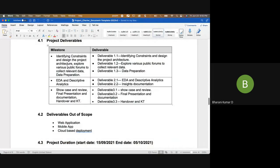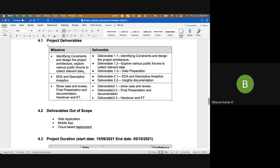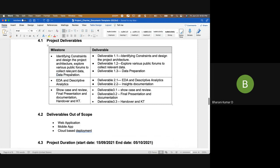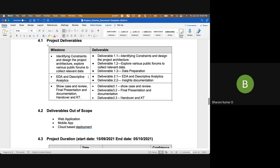For milestones, every small task you complete cannot be considered a milestone — a milestone means you have achieved something significant. Identifying constraints, designing the project architecture, exploring public forums to collect data, and data pre-processing would all be part of Phase 1. EDA and descriptive analytics would probably be Phase 2, and data preparation typically goes hand-in-hand with EDA.